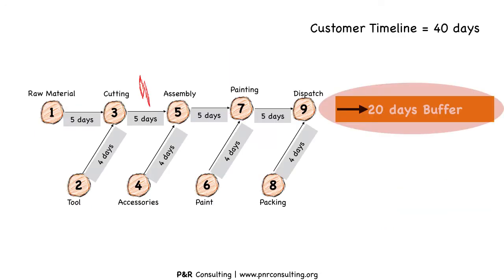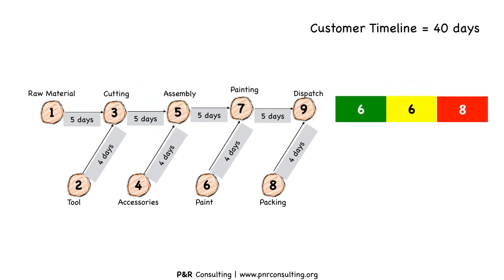The question is: what to monitor in a project? Which variable would help us understand its status better? It is the buffer that we need to focus on to check if the project is on track or off track. However, this buffer is very raw and not useful as such — it should be designed with right indicators to help us understand if slippage is acceptable or will impact the project. Thus we divide the time buffer into three zones: green, yellow, and red. Here we have divided 20 days into 6 in green, 6 in yellow, and 8 in red.